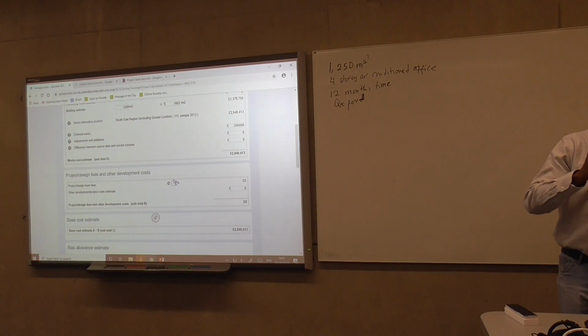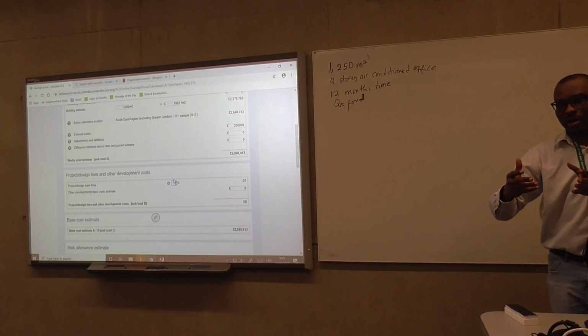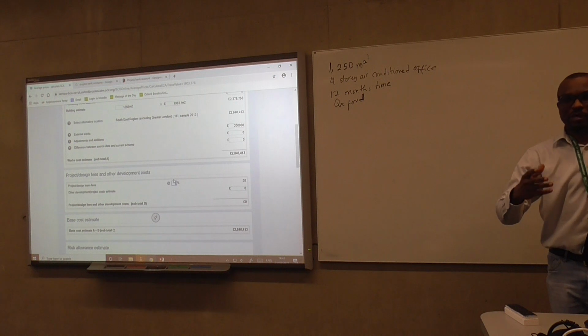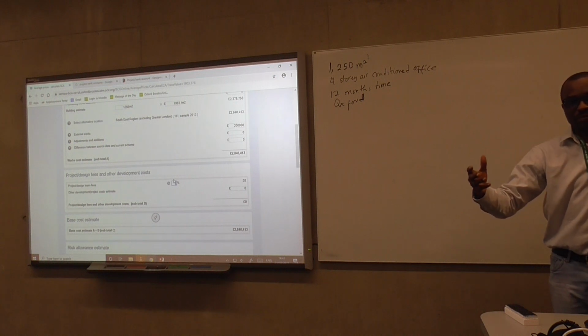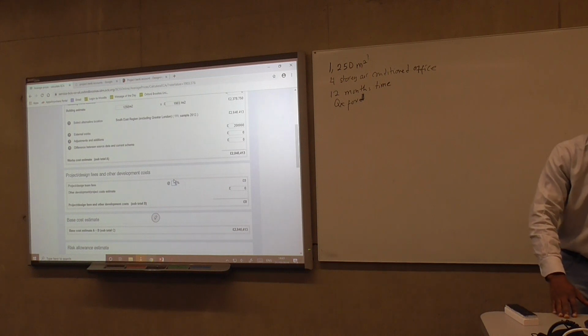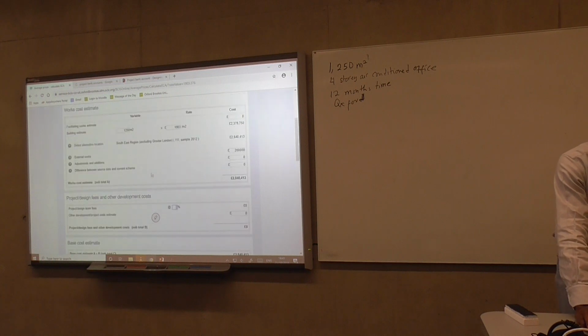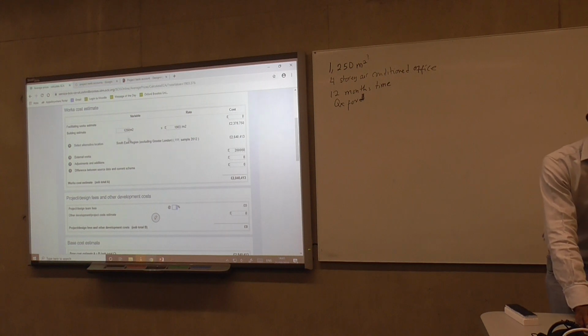But if the project is, let's say, 100,000, and you have 20% of 100,000, it's quite reasonable. So normally, when a project is quite small, you make your percentage a bit higher. And when the project size is quite large and a very major project, your percentage is reduced because you're able to make up for it in terms of the money. So that should serve as a guide. 20% is quite high, 5% may be low. Most people try to go for anything between 8 to 12 on the average. So let's assume we go for 10%.